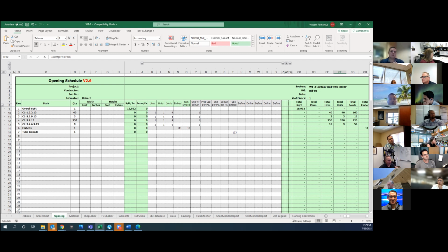But they don't actually care what the panel looks like for pricing. They just need the total stretch out, how many times they need to bend it, and how many inches of weld. So if we can get those pieces of information from the sales model team, that would really help complete the loop, because we can input that data from the sales model on the panels and get it out to the vendors.